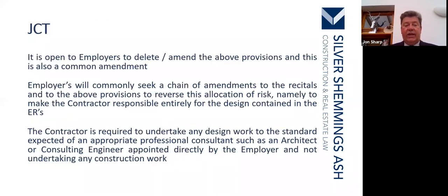Now, under the JCT, it is open to the employers to delete or amend the above provision, and this is also a common amendment that employers make. Employers will commonly seek to make a chain of amendments to the recitals and to the above provisions to reverse the allocation of risk, namely to make the contractor responsible entirely for the design contained in the employer's requirements.